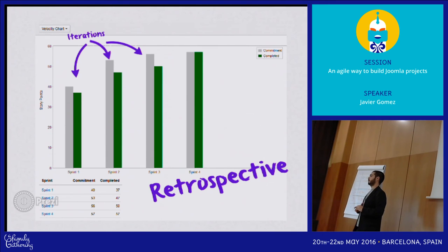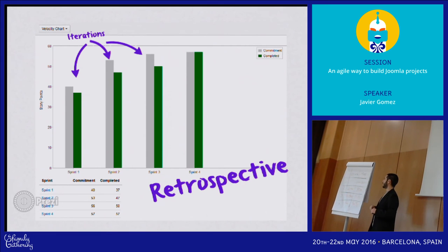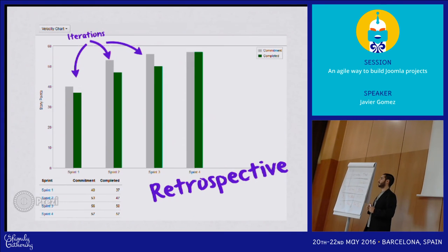We misinterpreted the first iteration. That's why we underestimated or overestimated the time, or we did not have the tasks clear. That's why there is this big difference between estimation and execution. So how can we do better next time, doing it again with the third iteration? The proposal is to try to go slower, maybe even writing steps to implement and getting it verified somewhere.